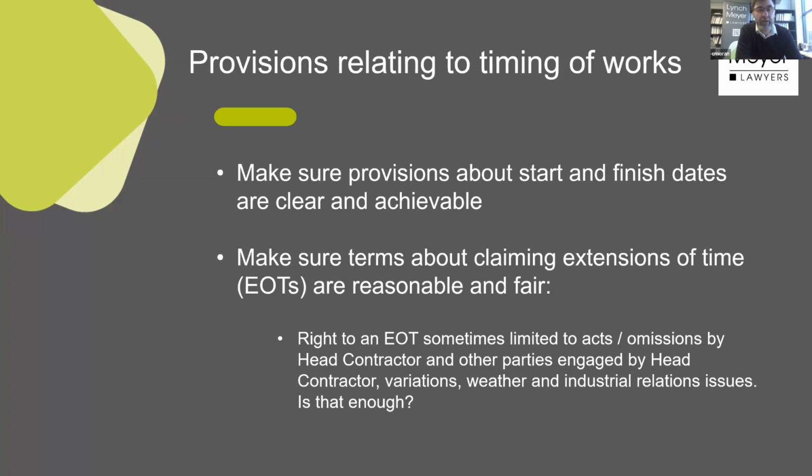You might, as part of your scope, have to supply certain items, certain paneling, let's say, and you're getting the paneling from, let's say, Vietnam or overseas somewhere. And you sort of feel like, look, these people have told me I'm going to get these materials in 2 months, but if it's 4 months, I don't want to have to wear that 2 month delay.